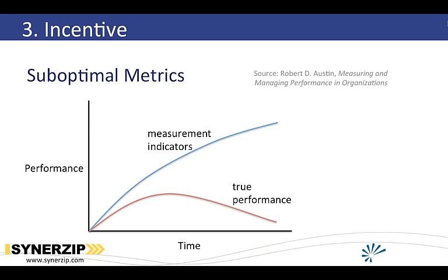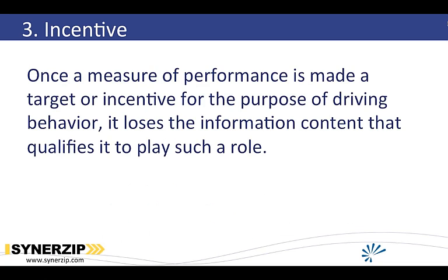You must keep them value neutral. The term we're going to use is value neutral. Because do you want to be able to use the metrics so that you can make a decision to move in a certain direction based on real data? The moment you start putting incentive on there, the moment you start putting people's livelihood at stake, then you can't trust those metrics anymore.